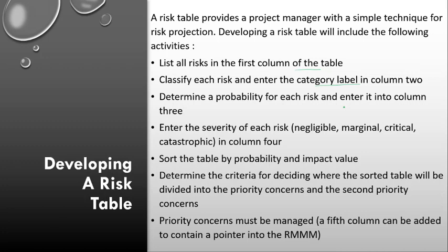Then determine the probability for each risk, and then enter the severity of each risk, so that we can give the priority, isn't it?